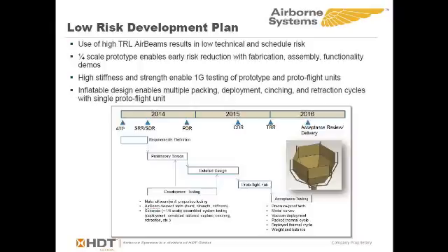In our development plan, we proposed a quarter scale, could be a 1/5 scale to match up with the JPL system. But that could be fabricated very early in the development process and advise the critical design review, really substantially reducing the risk. So that could be used for packing, deployment test, actual asteroid, simulated asteroid capture maneuvers and those kinds of things very early.